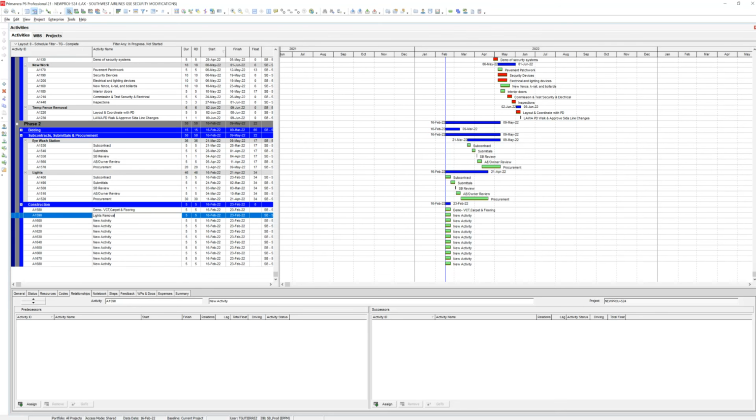Each one of those is its own folder right now, right? No. So these are their own activities. They're all within the construction folder. Okay. And with those activities, can you add more activities within that activity? No. Okay, so it's just summed up in one overall folder. They're all within the construction. But once you create an activity, that activity cannot be a folder. You can go back and create a folder, right? So let's say painting and exterior, we wanted to detail out that one a lot more. I'll go back and create a folder called painting and exterior, and then I add activities within that one.